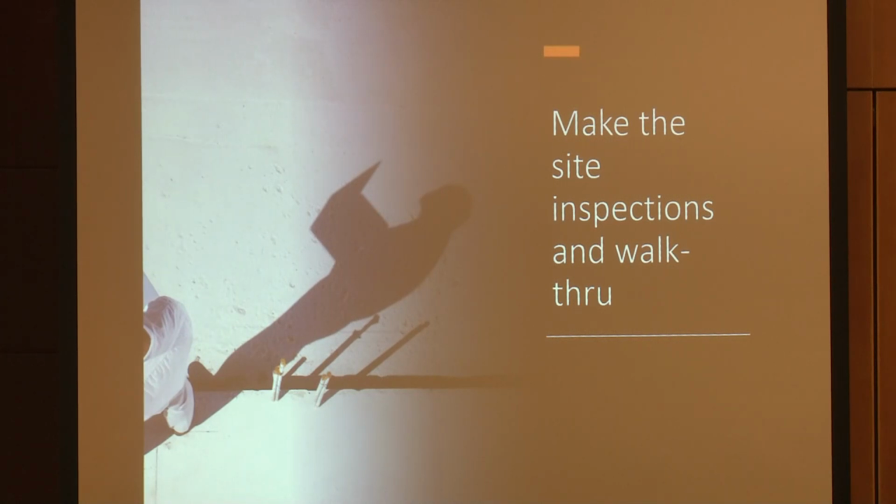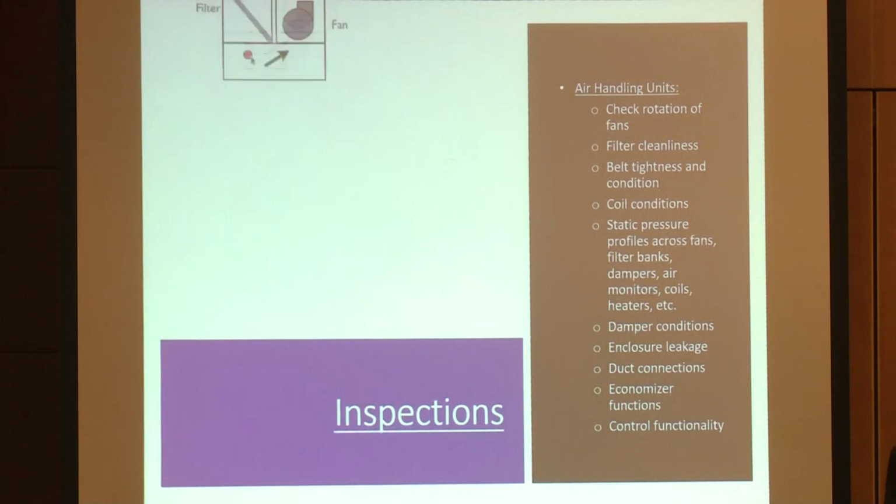You've got to go there, walk the job, and tell them all the things and all the places where they're not ready. You do not want to drag all your equipment there and find out that they're not ready and you can't do anything, and then you need to go back home. You need to go there and do the inspection, walk around, and see what's going on before you start. It's very important.